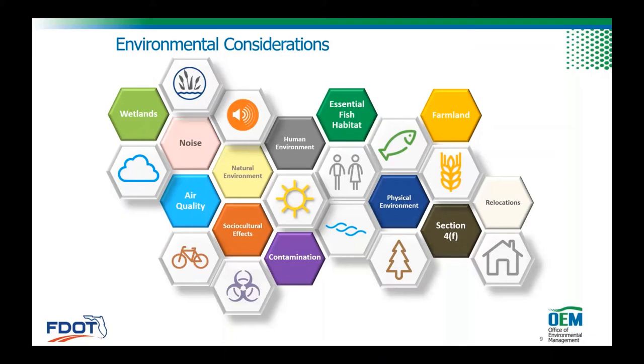The other thing that's great about those screening events that go out is in the previous process, when you were developing a project, you would work with each agency individually, and some of those engagements would be very linear, and some would only take a short period of time, and some of them would take a long period of time. In this screening event concept, we engage them all simultaneously, and they're all on the same timeline.